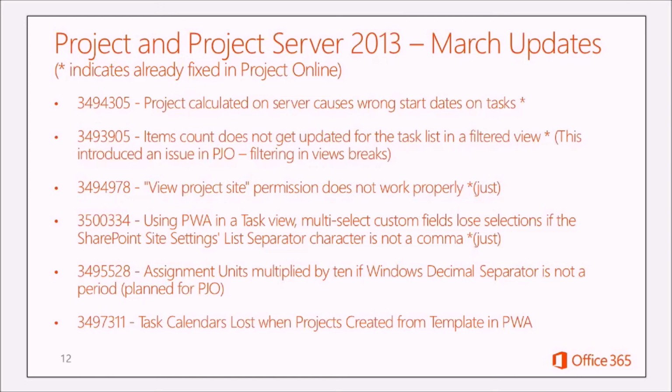So they go to the project center, they go to the new button, and they choose the particular enterprise project template that you choose for them. And as a part of this, the EPT is associated with a template. And so when they're done, they should see a list of tasks, and then they can take that list of tasks and assignments and resources and so forth and expand it out into their own project.